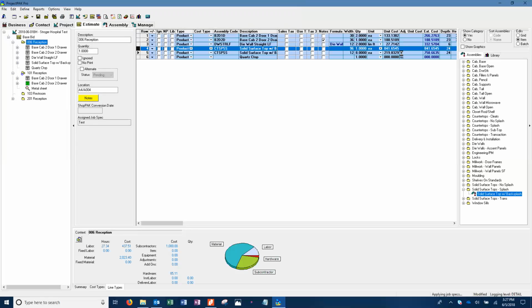Oh, wow, it's substantially wrong. What did we do wrong? Yeah, because historically we've always done lineal foot for countertops. I guess I'd like to keep it that way. Yeah. Okay. All right, I'm going to write him a note to do lineal foot for C-tops. He'll just write it so that you'll have solid surface with top with backsplash, and it'll say LF. Okay, and while he's in there, if he wants, I don't know if you charge for cove tops, I would assume, but I don't see a breakdown between applied splash and cove integral splashes. So you do integrals as well? Yes, we do. Okay.